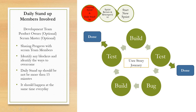The next stage is the ongoing sprint and the daily stand-up. This is how the user story journey looks. The development team picks one user story — each developer may pick one user story. It is built and sent to the QA team. The QA team tests the user story or functionality, and if it is all good then the product owner signs off the user story, meaning it goes to the done state.